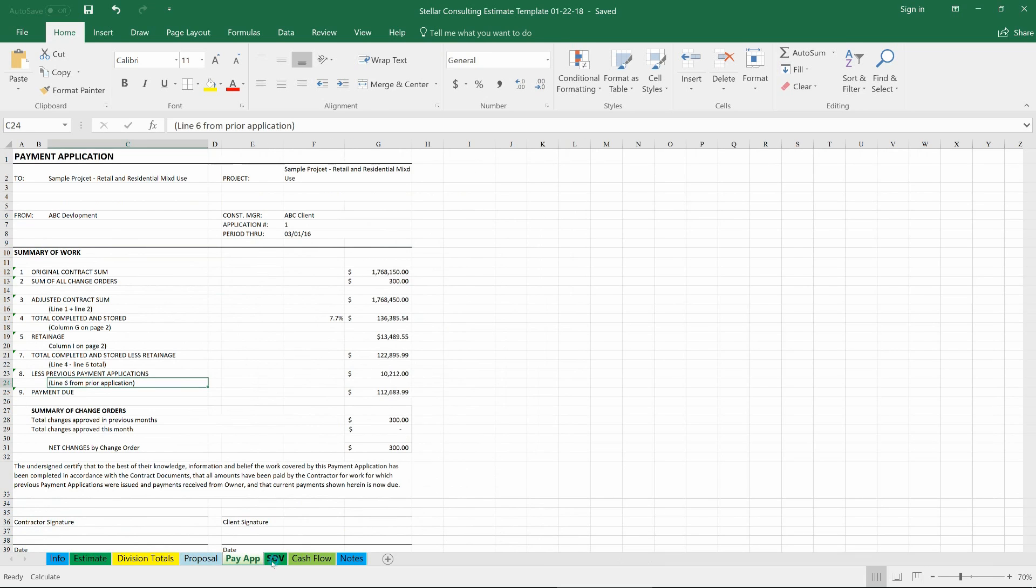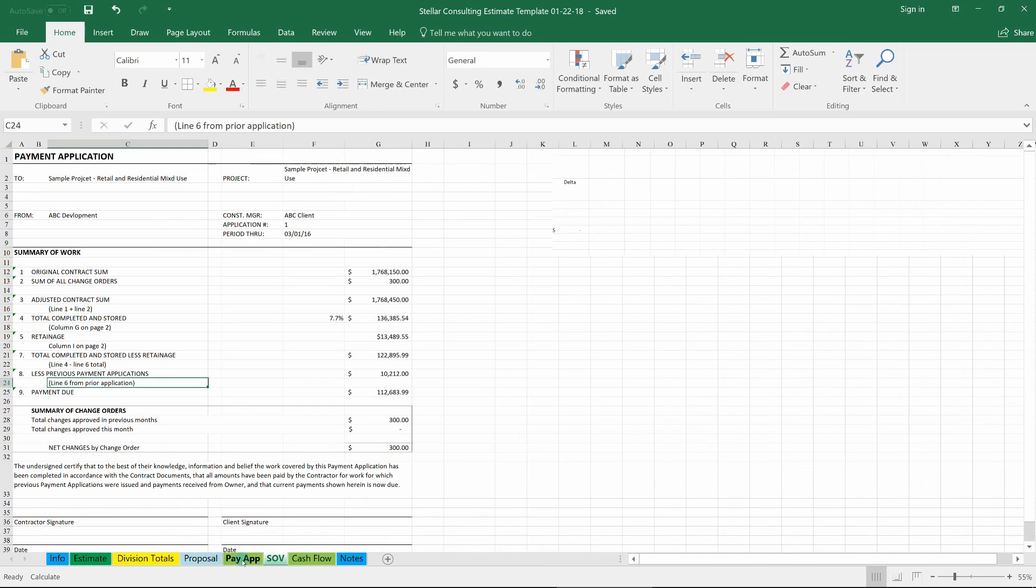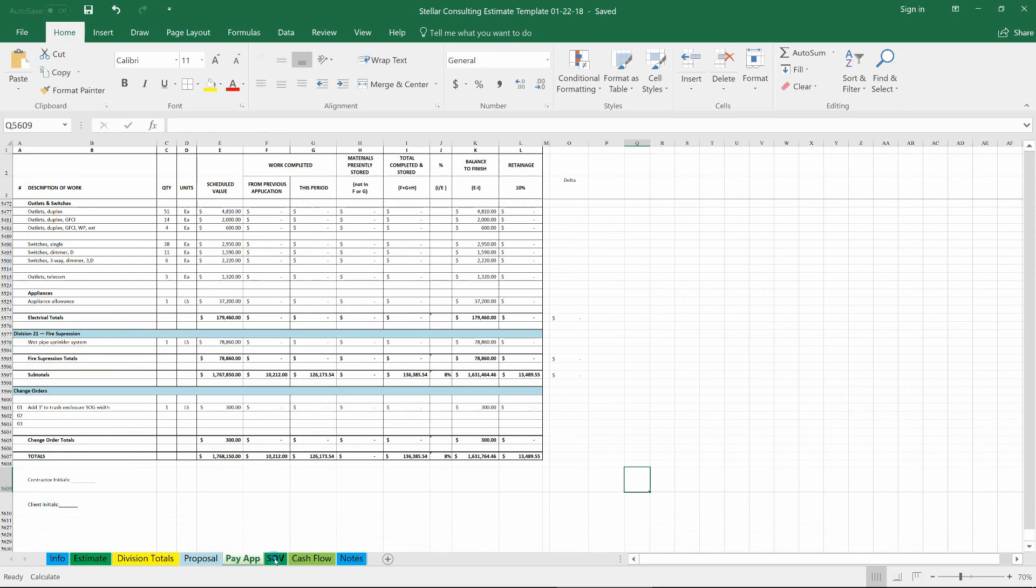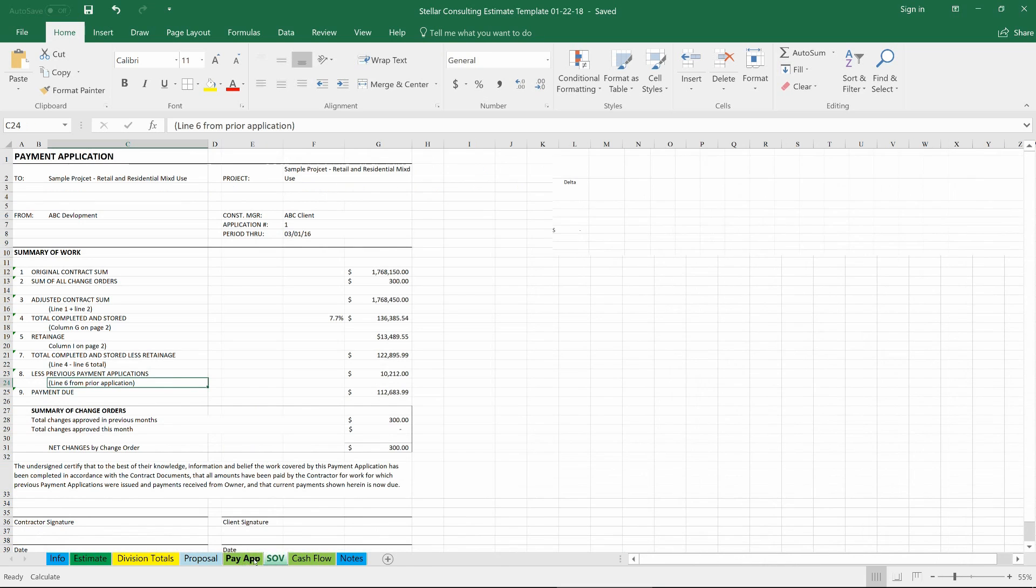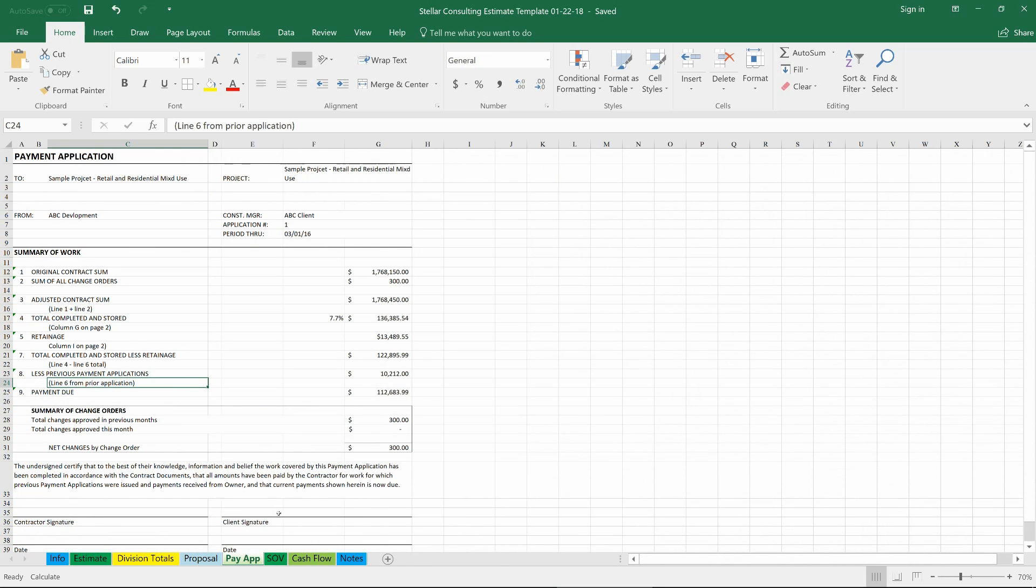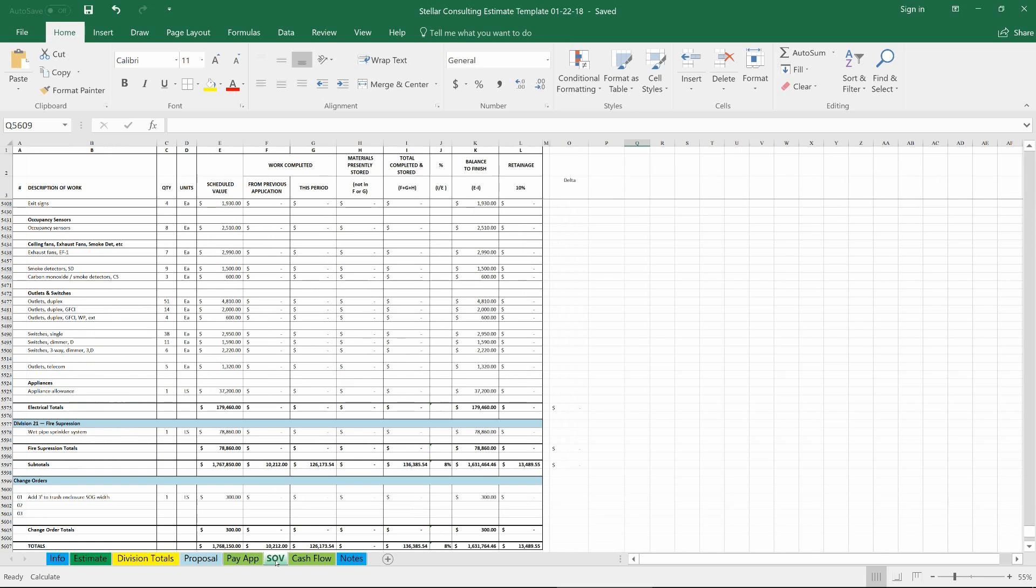Pay application and schedule value is kind of a whole separate thing. A lot of people don't bill by the percentage completion. I work in the ground and stored, but it certainly is the way for commercial construction and it's the most accurate and fair way of doing things.